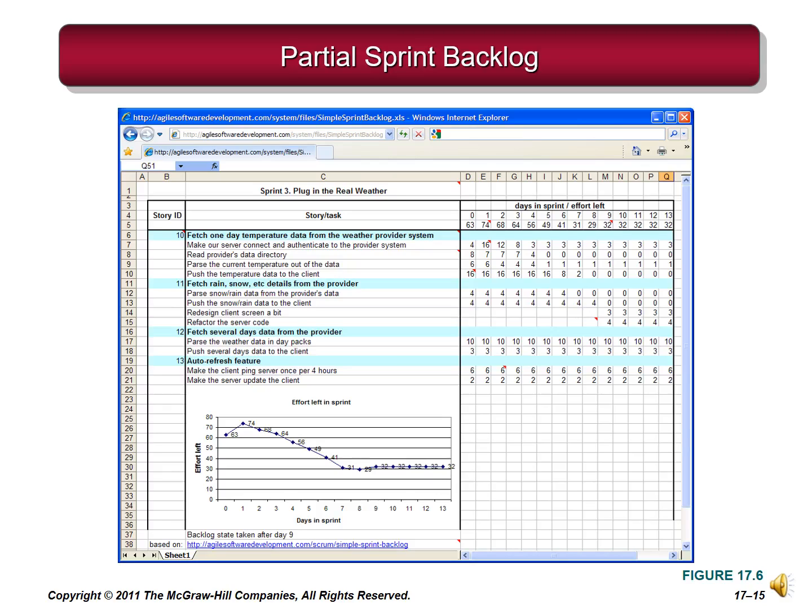Please note that Scrum does not use any of the conventional project management tools like Gantt charts or network diagrams. Instead, it relies on the daily Scrums and the active involvement of the product owner to manage workflow. Risk is mitigated by short developmental cycles and rigorous testing.